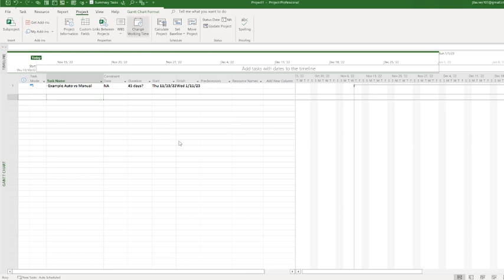Okay, so now we're going to add basically our holiday dates, right? You can do the standard calendar, or you can create a new calendar. And we might do that, but I'll just say we're going to make a copy of the standard calendar because we want to keep maybe weekends off. In the future, also, if you want to have any schedules built on the other calendars, we can most certainly do that, and you can see how that works. But we're just going to go with the standard for today. And so we'll call this the holiday calendar.